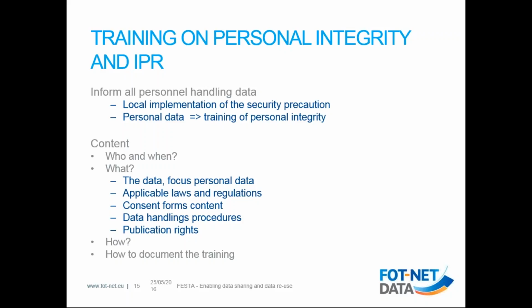There are also some recommendations on how you can do this, and finally how you document the training, because it's important to keep track of which personnel have been trained. We recommend that they sign some kind of paper, because the signature creates more focus that this is important. So we recommend having some kind of document that they sign.